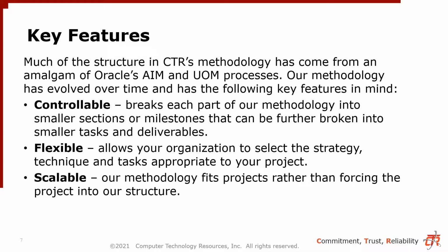And what we find is the key features of our methodology are that it's controllable, it's flexible, and it's scalable. When I talk about controllable, you always hear the phrase, eating the elephant bite by bite. We break it down to milestones, and we break those milestones down to tasks, and we break those tasks down to deliverables, so that we are able to monitor the progress, so that at the end of a month or 2 months or 3 months, we're not surprised because we've missed certain aspects.